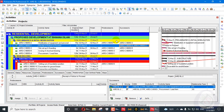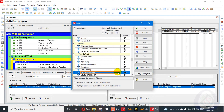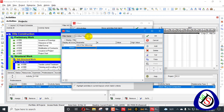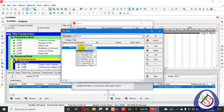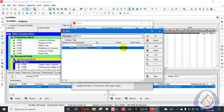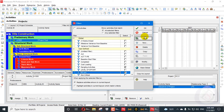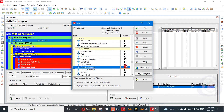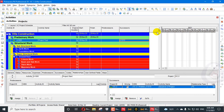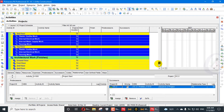To show a single predecessor filter, we can go here and add a new filter. Set the filter condition: predecessor equals 'no predecessor,' and apply. When we apply 'no predecessor,' one activity shows up with no predecessor — that is the start activity.